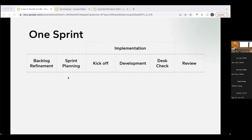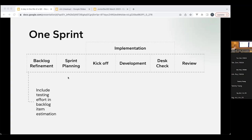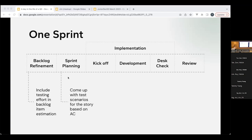The idea is that a QE can be involved all the way at the start. These are just some stages inside a sprint. For example, during backlog refinement, a QE can include testing efforts in the backlog item estimation — we can decide how much time is spent on this item, how many things we need to test. Then in sprint planning, we can come up with test scenarios together with the devs based on the acceptance criteria.